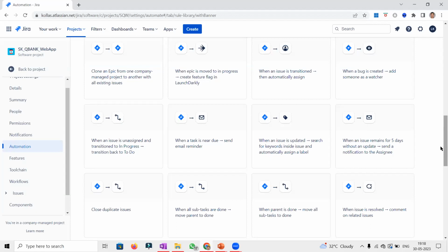We have also written automations related to Epic, and we have a feature as well, where the feature's parent is Epic, so that is our hierarchy. For the features, we have stories and tasks. We are even using Tempo Timesheets, where one of the fields is account, which is for finance.